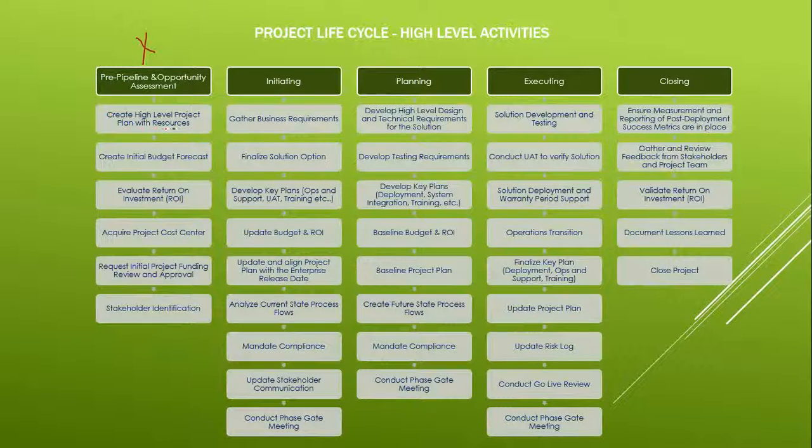High level project plan with the resources, depending upon that, first, before the gate review is done, first gate review before planning, before initiating. Create initial budget and forecast, evaluate return on investment. Return on investment means how much investment we are talking about and what return we are going to get. There is a formula to do that. That's why I said very less likely you will be part of it.